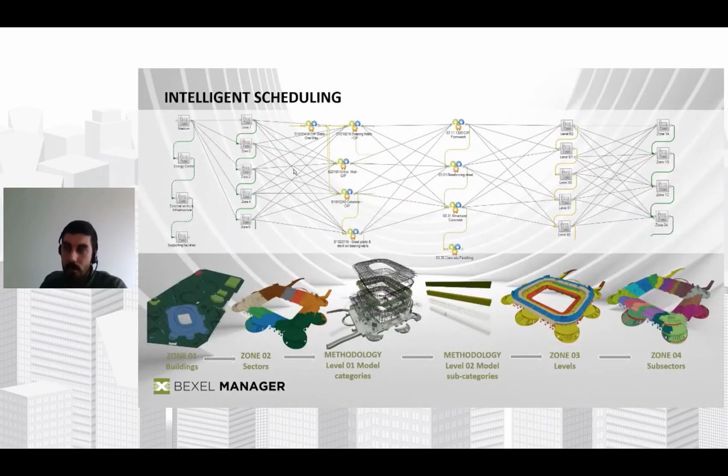This is also one of the real use cases where we were able to implement the same logic, on a FIFA stadium project, a large-scale project, very complex, with a lot of different groups of works. It enabled us to create a schedule of more than 100,000 relationships and tasks for one single project, because we were able to organize the schedule on the main schedule organizational levels instead of creating every task and every relationship manually.